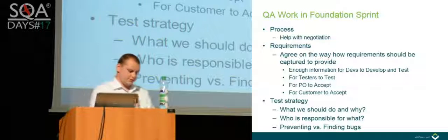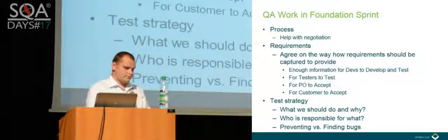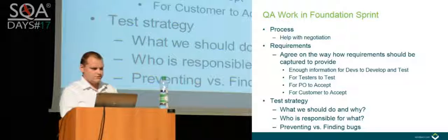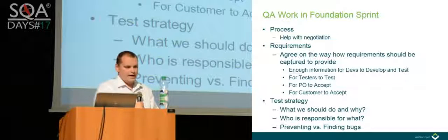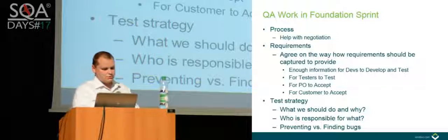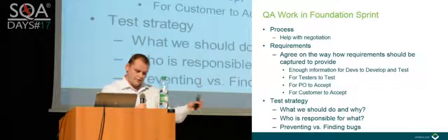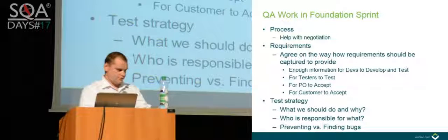First is this process, and the testing on the customer side. That's the most critical and most struggling thing, because this is something they typically never do, and it's something new for them. So we should sit together with them, our QA lead or maybe the whole QA team, and do some workshop, like explain this is the way how we work in the sprint. After each sprint we deliver some piece of work. It's defined in the user stories.